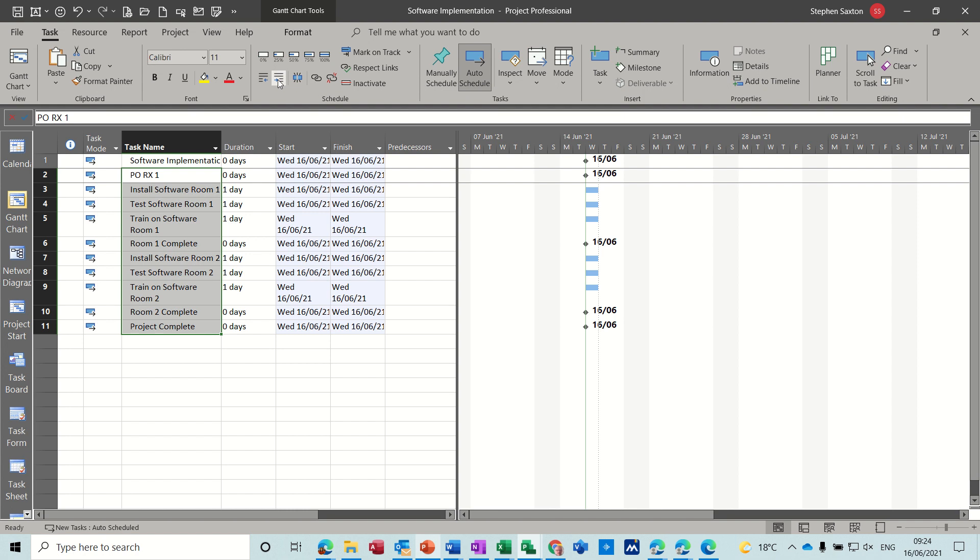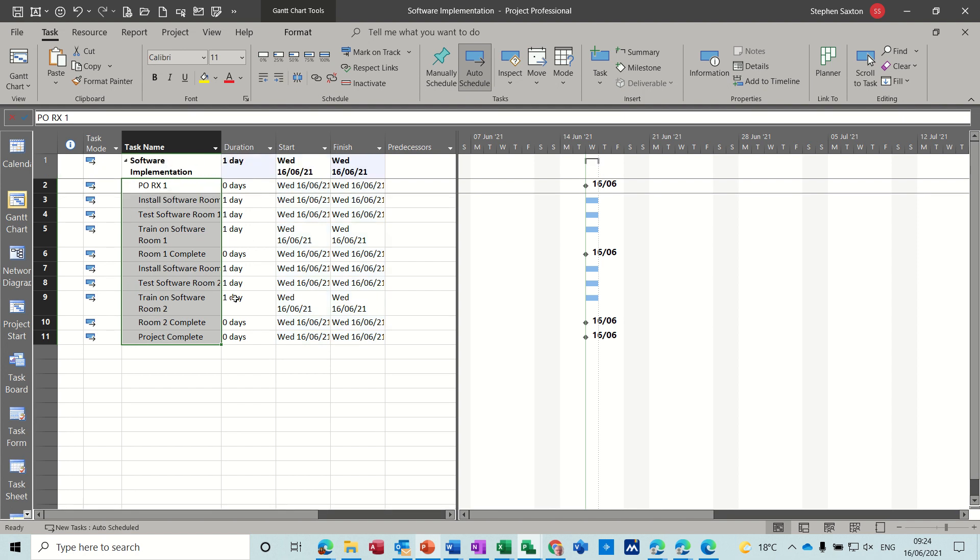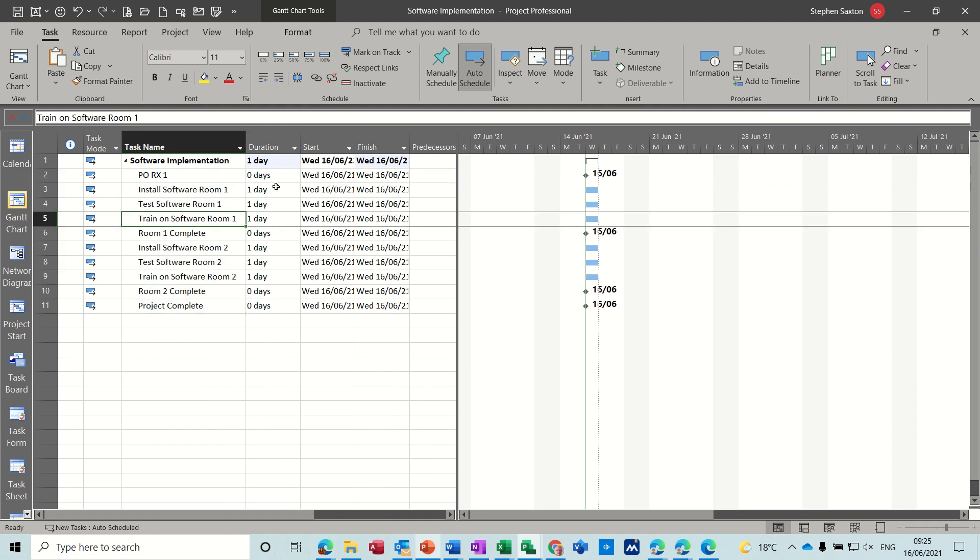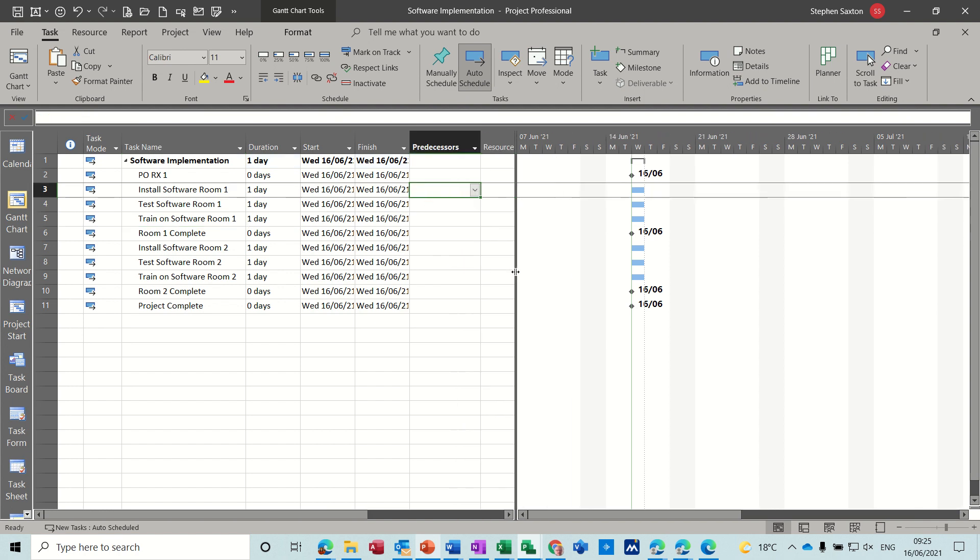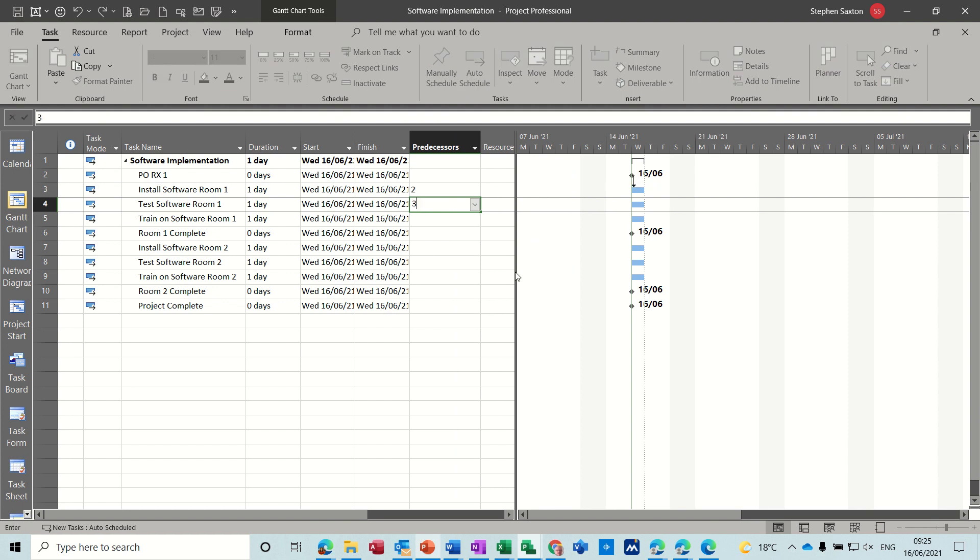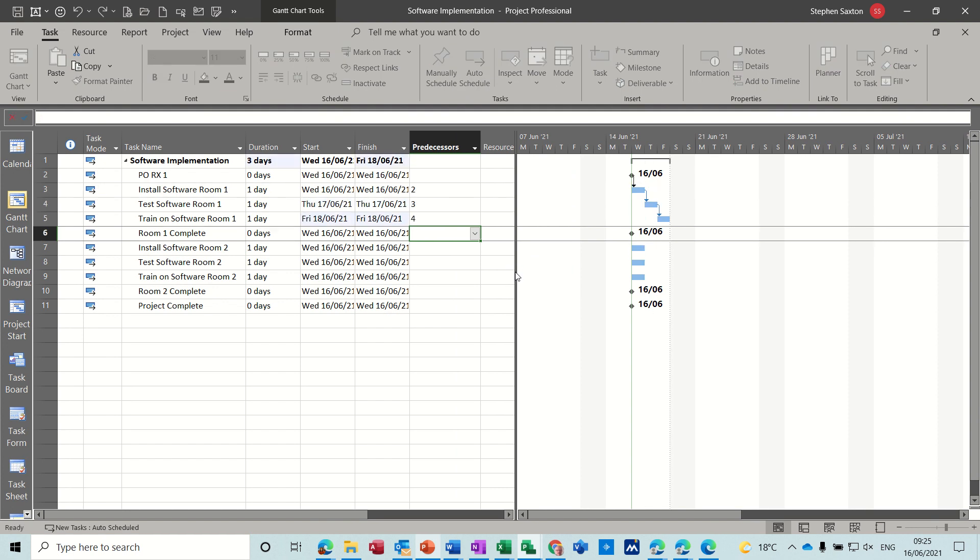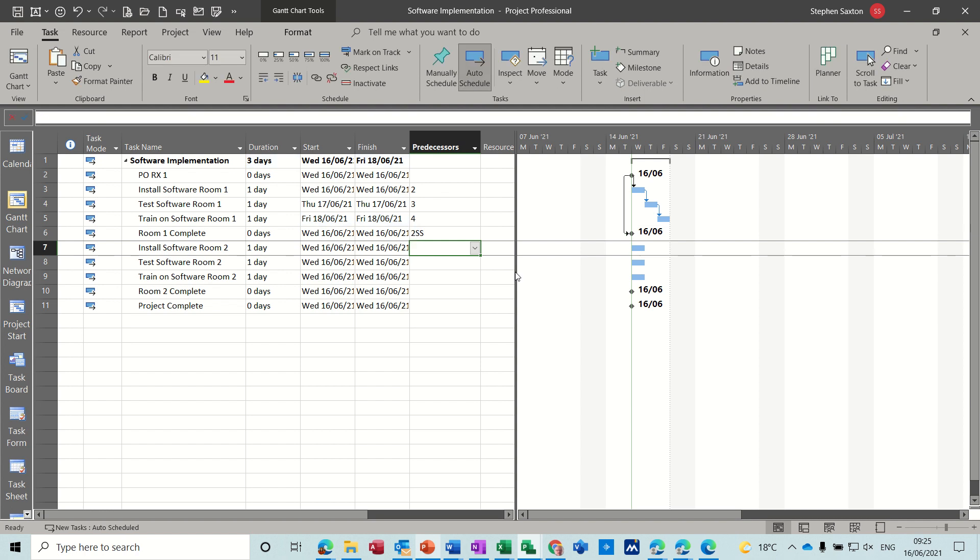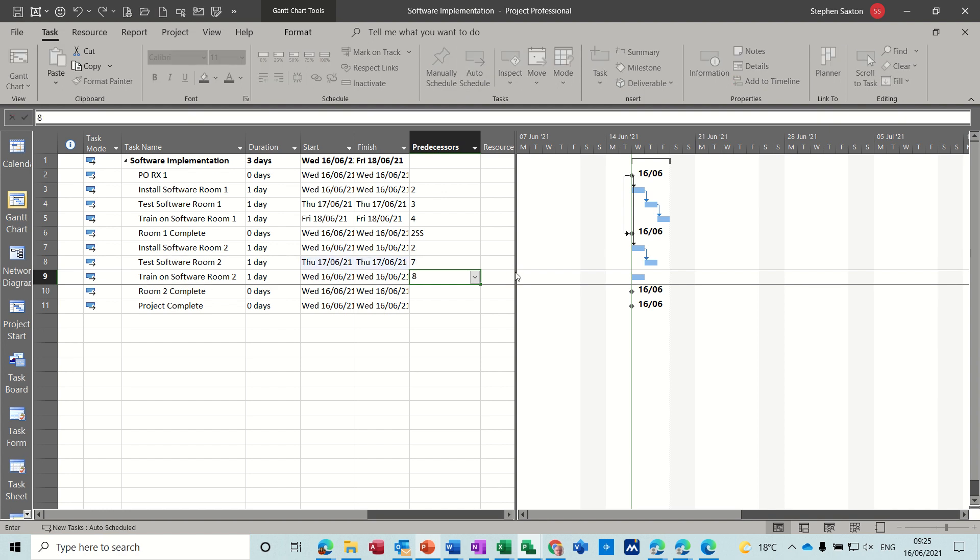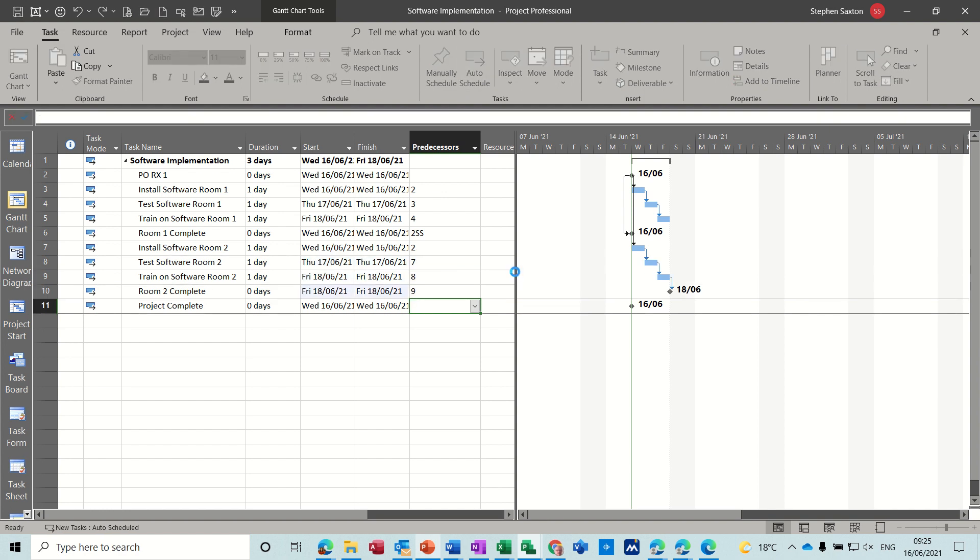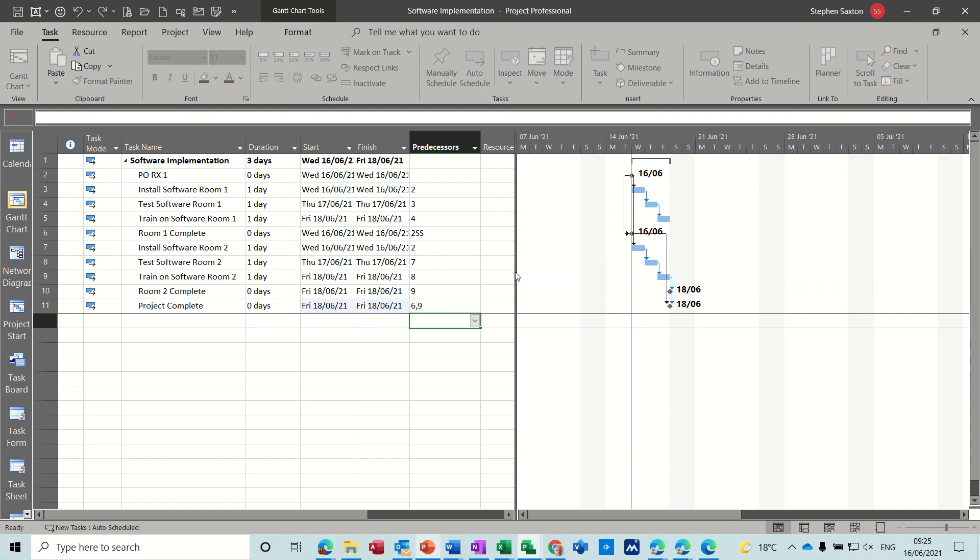And I also want these indenting underneath the title, so the title is there and now you can see that you've got the durations coming in, everything's sitting there. Then it's a case of just doing your links that you would normally do and then you're ready to go. So this is going to be two, three, four, and then that's going to be two SS, and that's going to be two, six, seven, eight, nine, and that's going to be six and nine, whatever, that's the link or something similar to that.